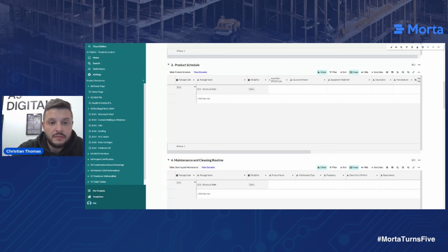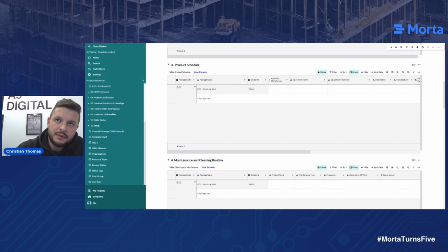and then an attached file, when it's ready to be handed over, can be put in, and it's offered for review. It runs through a QA review to ensure that everything's populated correctly, and it's not just populated with 'refer to attach, refer to attach, refer to attach', which used to happen quite frequently, but I'm happy to report it's reducing year on year. Then the workflow itself, and the setup within this structure, is that we'll set up the packages, who indeed is, let's say, the QA manager for the QA review, and the specific person and user that is looking after that package.